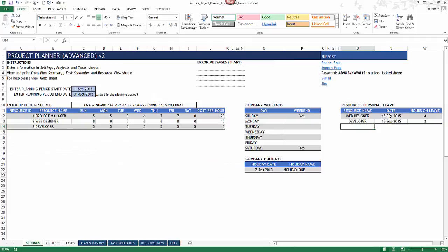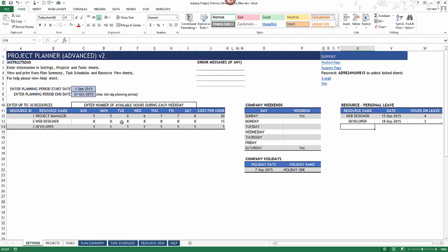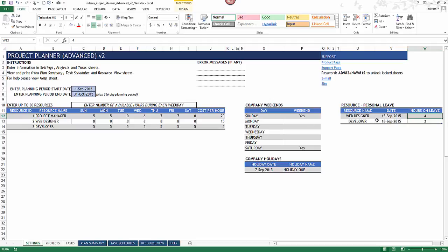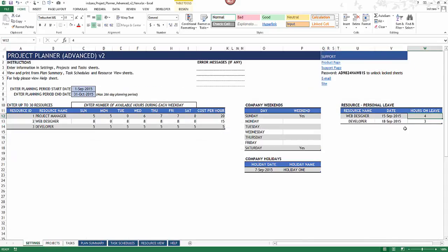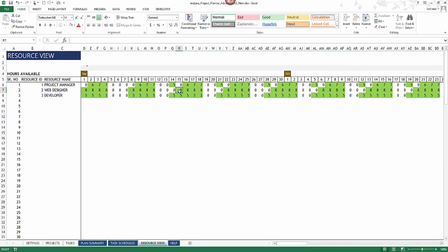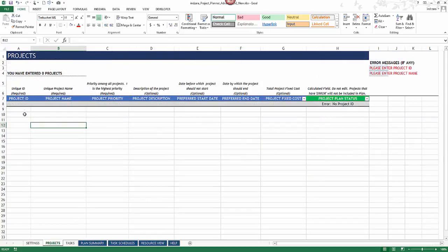September 15th is a Tuesday. The web designer usually works eight hours on Tuesdays, but since the web designer is taking four hours off, on September 15th the resource is available for only four hours. We can verify this in the resource view — the web designer shows four hours available on September 15th. If I set three hours of leave instead, the person will be available for five hours.